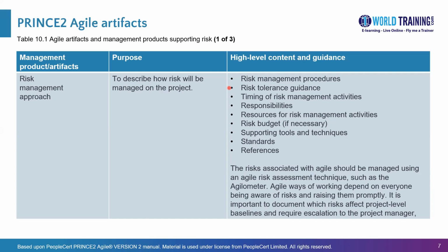So for example, 10% of the overall project budget might be a risk tolerance level. Therefore, the actions for the risks should bring down the risks below that 10% value of the total budget. Otherwise, it may be decided that the project should not continue or even start. However, at the beginning, there may be a lack of understanding of detailed risks, and only high-level risks will be known.